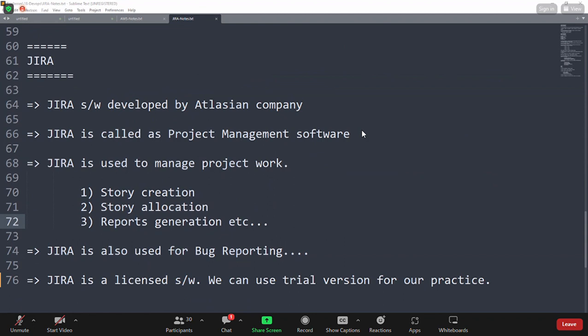In case of dependencies, if you have a dependency on a different team, we will tell it in the scrum call that there is a dependency. So I park that story and work on another story. Suppose your story is dependent on some other story, then you have to wait for that. You keep that on hold, take another story and work on that. No need to go back to the backlog. You park that, take the new story and complete that. Once your dependency is resolved, you can continue your work.